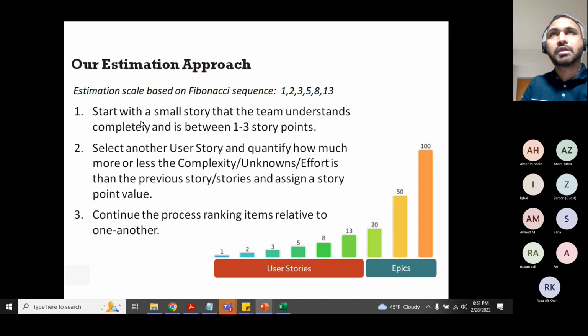So that's why some teams, you might be thinking, other than Fibonacci series, what are the other techniques for the estimates? There are some T-shirt sizing as well, like extra small, small, medium, large, and then extra large. So that's how it goes as well. Some of the teams do T-shirt sizing as well, especially for epics, because epics can be broken down to that level, but the stories have lots of variations over here.